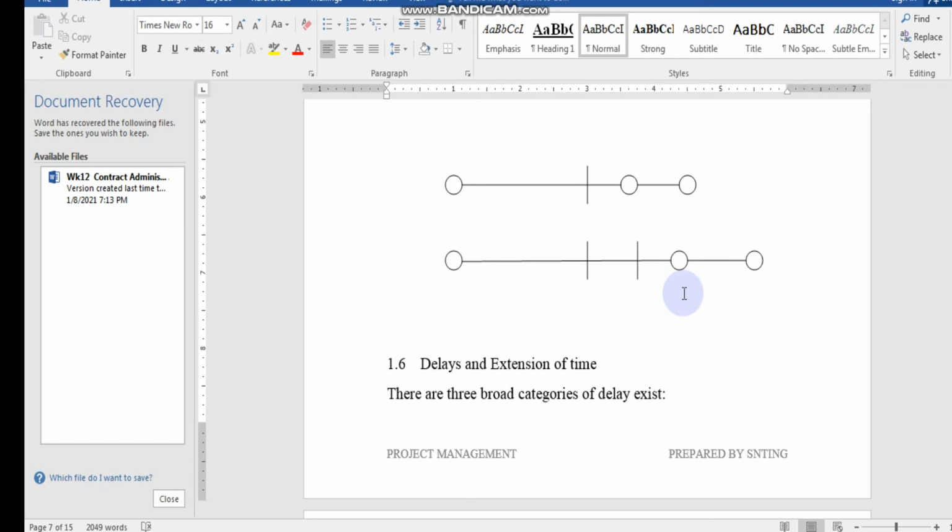It doesn't mean that today the contract ends, tomorrow you write in and say that I'm practically complete. Because if the condition of practical completion is to have acceptance by all the authorities involved, then you may have another month or two trying to get the authority to make an appointment, come to your site and check your work, you see. So this is something you have to be very well aware of.